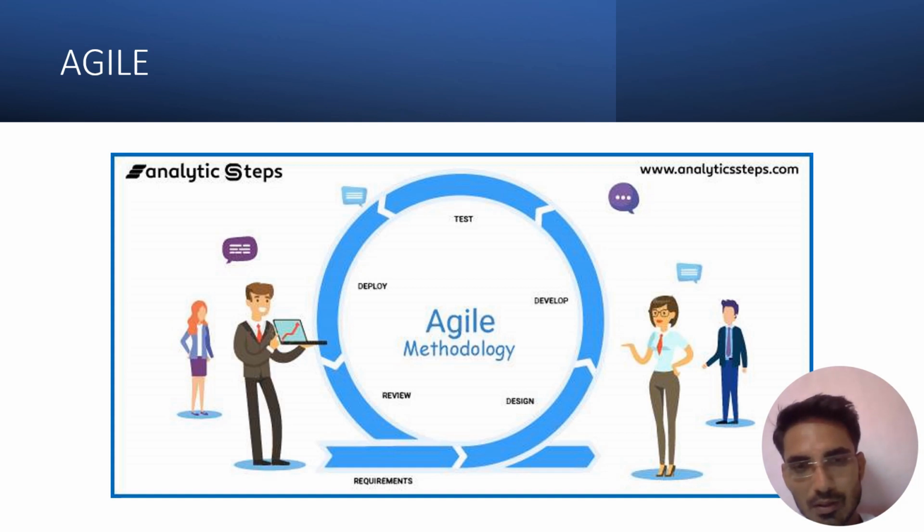After the development part is complete, only then does the testing team come into the picture and test. In this scenario, it is more time consuming. Why? Because while the design team is creating the design for the application, the development team doesn't have any work. At that time they just relax, and only once the design is ready do they come into the picture.